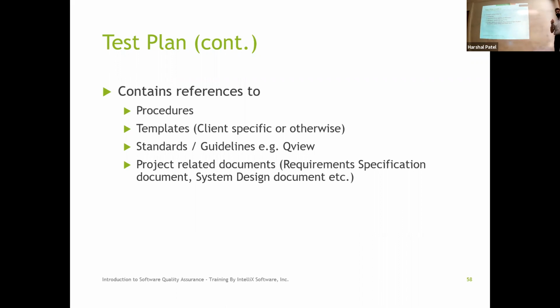So think about it. You started with a certain set of requirements documents. As part of contingency planning, you have to change certain things in that document. Now, the estimate that you gave originally was based on the original document. So if your scope changes, your estimate is going to change. Right? It's either going to go up or it's going to go down. So when you say, hey, I'm writing this test plan, it's important to state which requirement document and which design document this test plan is written against.